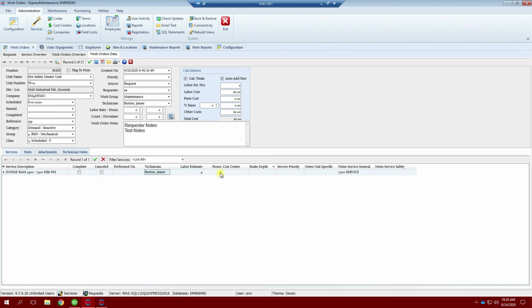And then you have your actual hours. I put these two right next to each other so whoever's performing the service can look at this and say, okay, this is supposed to take 4 hours. So if I'm lollygagging, they'll know that this was supposed to take 4 hours and I'm taking 6. And there's a report for that, and that's an issue.